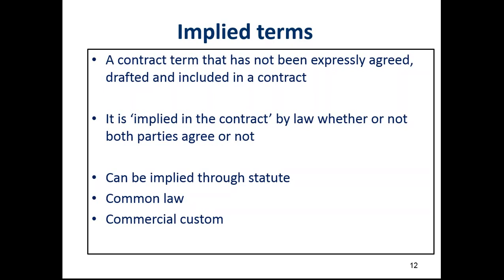So for example, in UK law, we have an act of law that applies to contract called the Late Payments Act 2002. In the Late Payments Act, it says if you do not pay me within 30 days, I have the right to claim 8% plus the base rate interest, which is then recalculated every day.